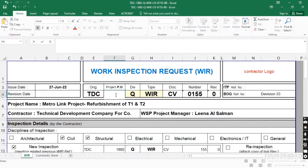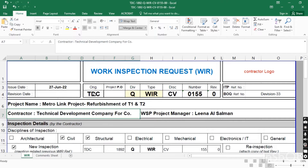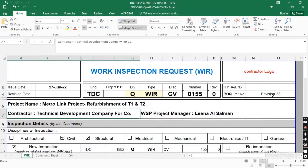In the WIR number field you have to put your company name, division, quality, type of document, discipline — for example if you are submitting for civil write 'civil', for electrical write 'electrical', architecture, mechanical, survey, whatever applies. This is the serial number of the WIR. If you are submitting a revision, put the revision number here. You also have to write the ITP number for the work, and the division number taken from the BOQ reference number.